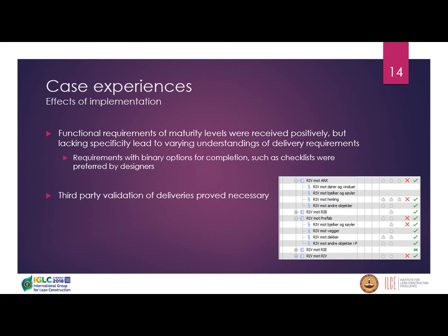The functional requirements of maturity levels were considered successful, because instead of the approaches taking the geometrical requirements, where you're really pushing more work on the designers for what they should do, the approach of specifying functional requirements for maturity levels rather associates the existing work that the designers had always been doing to the context of overall project development.